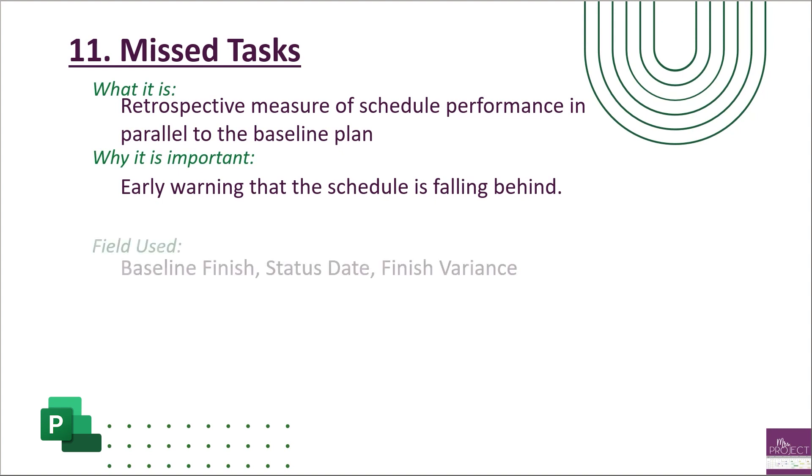The fields used for this - there's a couple different ones. You have your baseline finish, of course, and then your status date and your finish variance. The finish variance is looking at a comparison of your baseline finish to your promised finish. Project already calculates this for you, which is great, but you have to make sure it's only looking at your baseline zero.